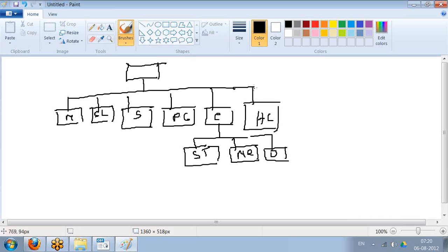And then only the party starts, and the party itself will go on for a couple of hours. So then the party happens. Then after the party comes after-party cleaning again. So now if you estimate each of these boxes, it will be at least 3 to 4 times more than the 3 hours. It will take 10 hours.